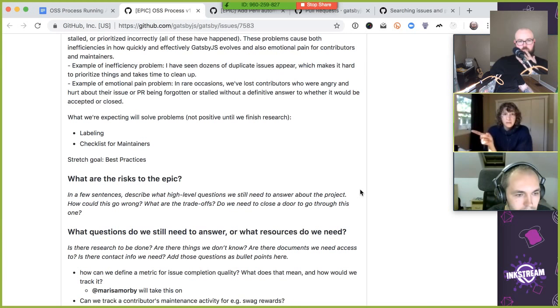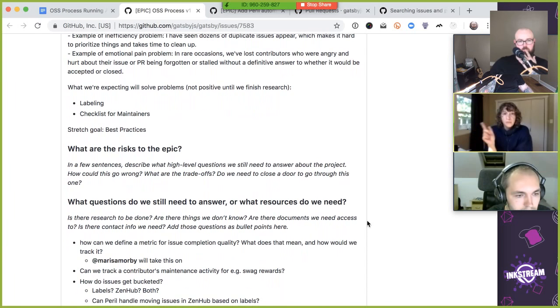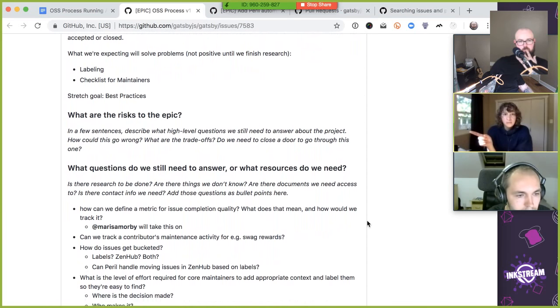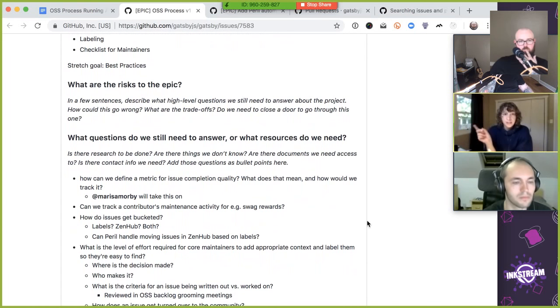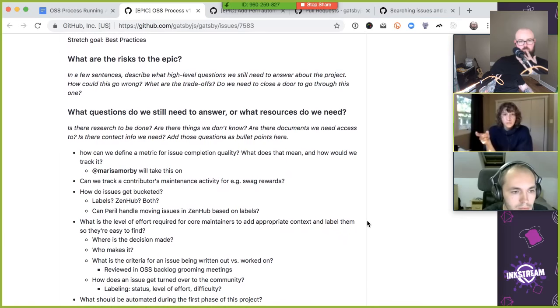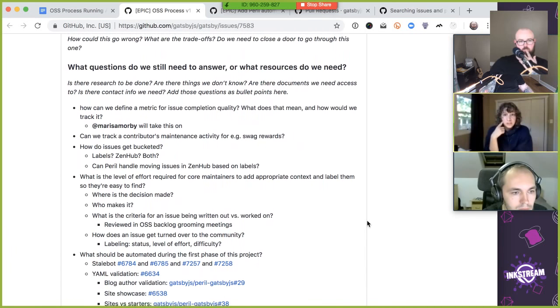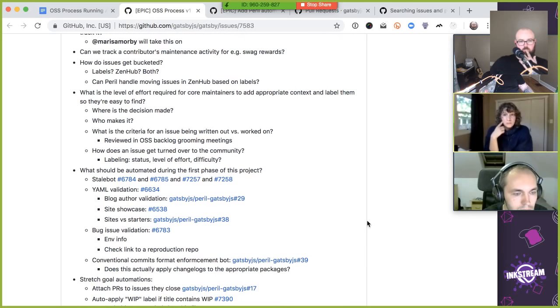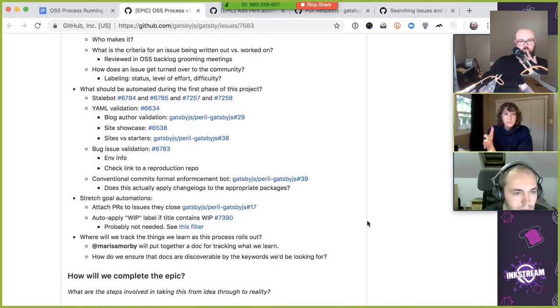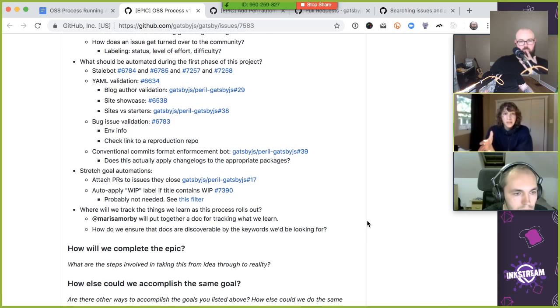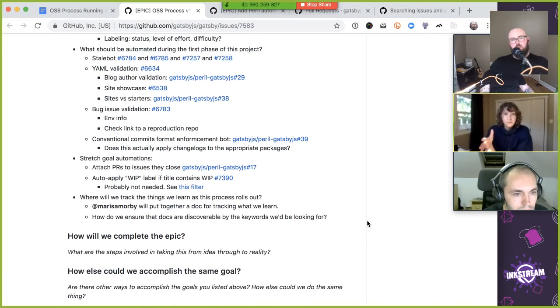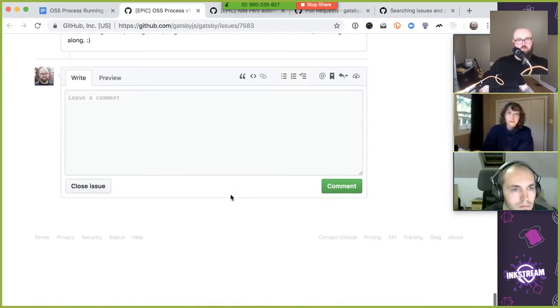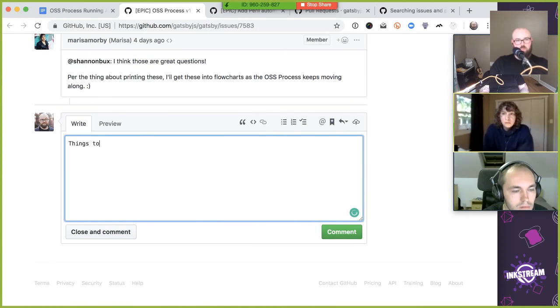So that agenda you have today, we can just move these deliverables into that agenda, and that way we can track them. Would be a suggestion. I don't think we need a Gantt chart because we're not time boxing this into a specific amount of time. We have things that we need to hit and finish in order for the epic to be completed. So okay, so things to be done.